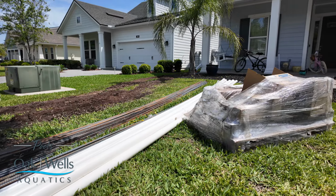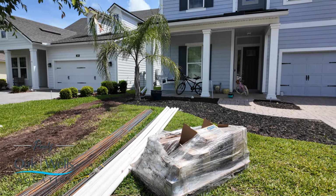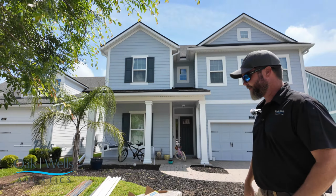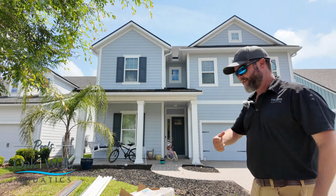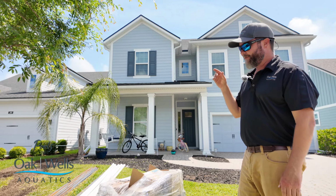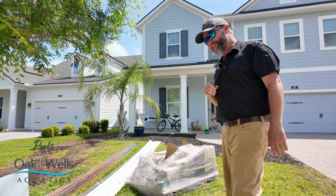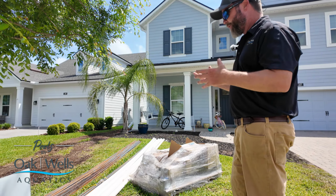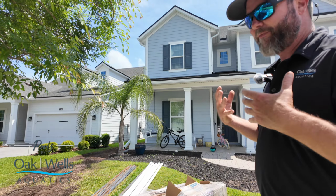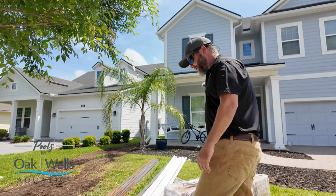I get it, but what we have here is a little bit skinny access, and the Moffett trucks bring this in sideways. So it all gets hand loaded in the back, which we'll see all steel guys and girls back there doing this, and they're dragging the stuff all the way to the back. It's like 85 degrees right now, but in the summertime when it's 95 and 100% humidity, those bars of steel get about 150 degrees. So this is one of the most important parts of the job, and it's also the part that takes a lot of labor, a lot of work. Some key people do this part of the work.